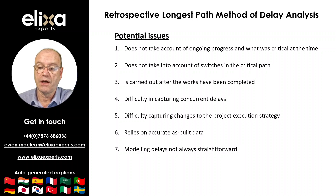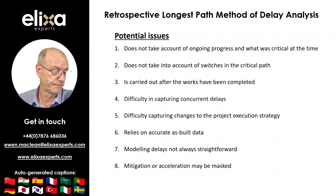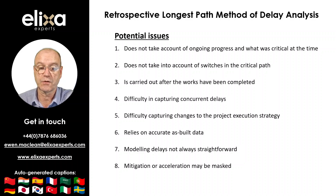This can lead to unrepresentative delays being included in the analysis, or possibly some delays either being ignored or exaggerated over others. The retrospective longest path method of delay analysis may also overlook mitigation or acceleration, which can conceal or distort the true status of the works.